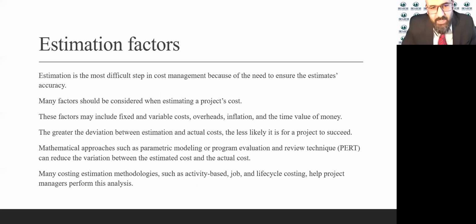There are a few factors that you should be aware of when you estimate the cost. These are the factors that you should consider when you do the cost estimating for a project, such as fixed and variable cost, overhead, inflation, or time value of money, which means the interest rate if you are taking a loan from a bank.